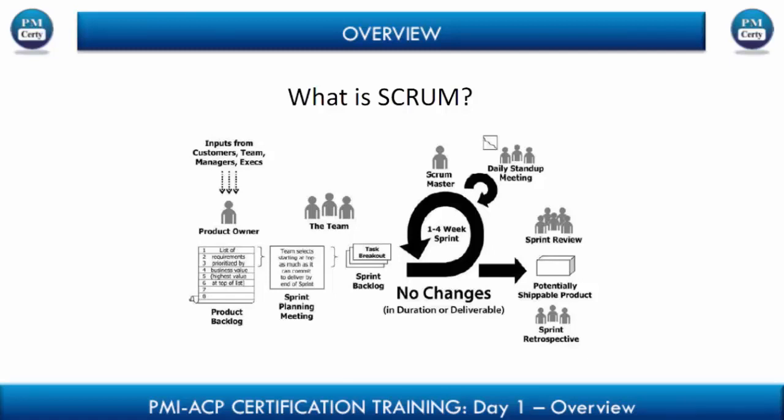Please remember cardinal principles. The product owner is the only voice of customer, the only person who can suggest what is the highest priority. Nobody else can dictate to the team, and none of the team members can make a change in terms of priorities. They can only negotiate on whether they can complete that requirement or not. So this is typically called a sprint planning meeting or an iteration planning meeting.